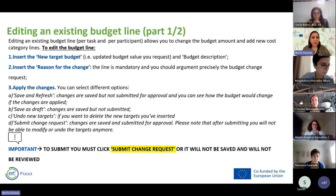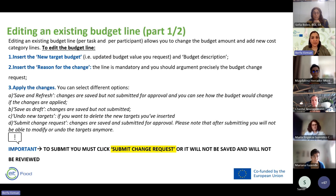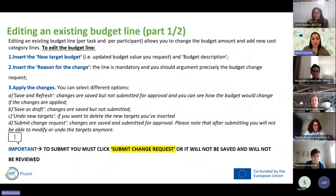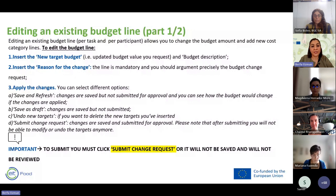To edit an existing budget line — per task and per participant — you can change the budget amount and add new cost categories. Insert new target budgets and a proper budget description, then add your reason for change, which is mandatory. You must clearly argue the budget change request. As a third step, you apply the change. Selecting 'Save and Refresh' saves the changes but does not submit them for approval, allowing you to see how the budget would change if applied.